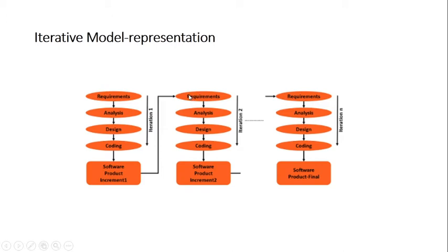Though externally we haven't represented it here as iterative, actually it is the iterative waterfall approach, because you require a feedback part to go back and make the corrections or modifications. So it is the iterative waterfall approach which is working here. In each iteration, you develop, you give it to the customer. After some time, maybe a gap of 2 months, 3 months, 6 months, one more iteration or module is required, then again we repeat these steps and deliver it to the customer.